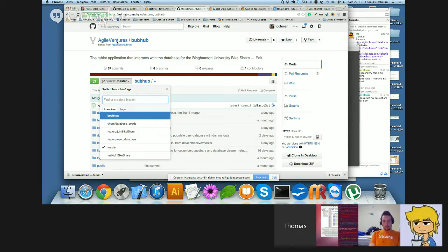But when you demonstrate, you show it on the staging server, because you want his feedback on the features before you go into production. Because if he has some objections, or he doesn't accept the stories, or he wants something else added, then you tell the developers to implement some changes. Redeploy those changes to the staging server and show it to your client again, get an acceptance, and then your code is mature enough to go into production.